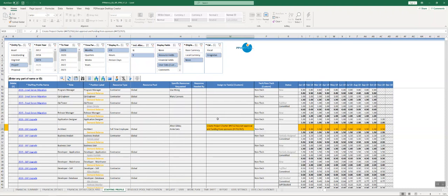Let me take off my project manager hat and now put on my resource manager hat. I'll now assign resources, which I can also do in the XLI. I'll click on the assign resources button. The XLI is going to ask whether I want to auto assign the specific resources requested for these positions, for all possible positions, in this case just one. Do I want to auto assign Alton Gibbs and Arnie Getz? I'm going to click yes.